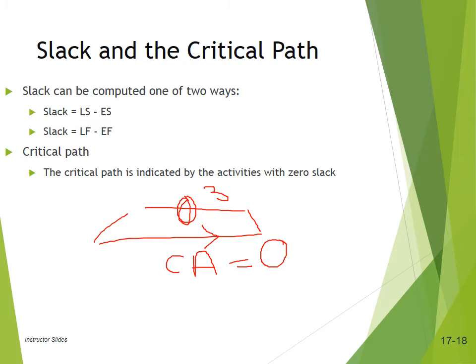So if the path has got a slack of 3 days, he might delay it by 2 days, so that even then he will have 1 day in hand. But if he delays it by 3 days, then that path becomes critical. So by chance, if that path gets delayed by 1 more day, then the project will be delayed. So project managers won't really want that.